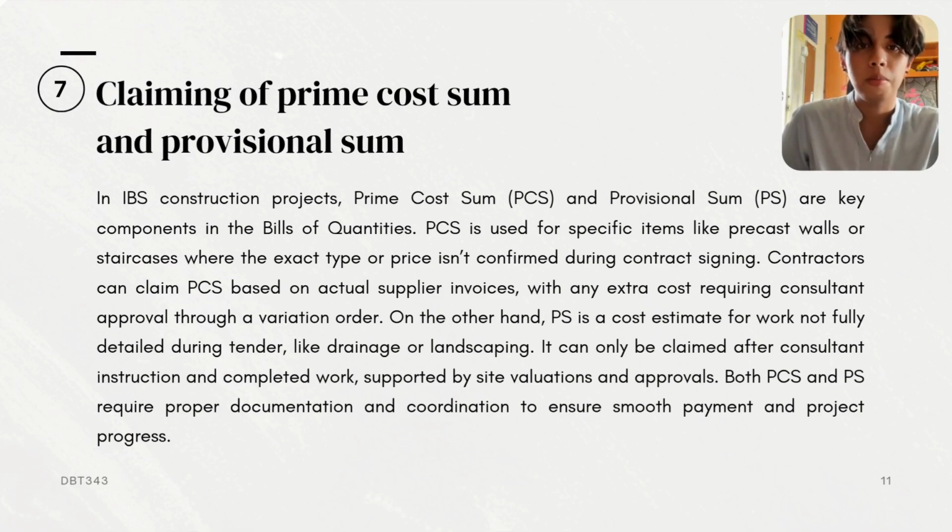PS claim can only be made after the consultant instructs the work to proceed and the work is completed. The claim must be supported by the site valuation, photographs, and consultant approval. Overall, accurate records, including invoices and site instructions, are essential for smooth processing and payment of PCS and PS claims in the IBS construction project.